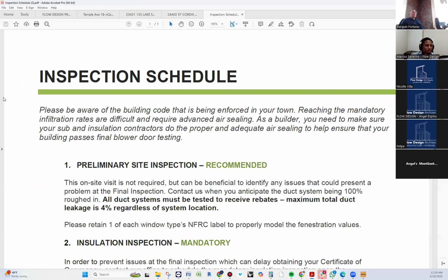So what does the Hertz rating report processing entail? The Hertz rating process could be generally divided into 3 steps. Step 1 is called a projected Hertz. You sound really good when you know this term, so memorize them. So the first thing that we're going to be getting when we get the permit set and we send it to Herb is a projected Hertz. I'm going to show you what it looks like.